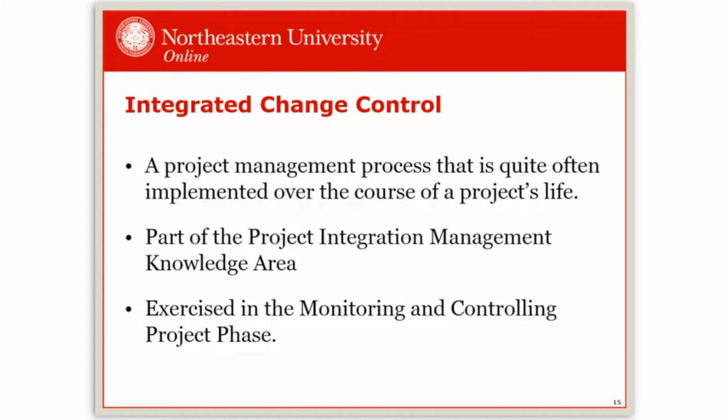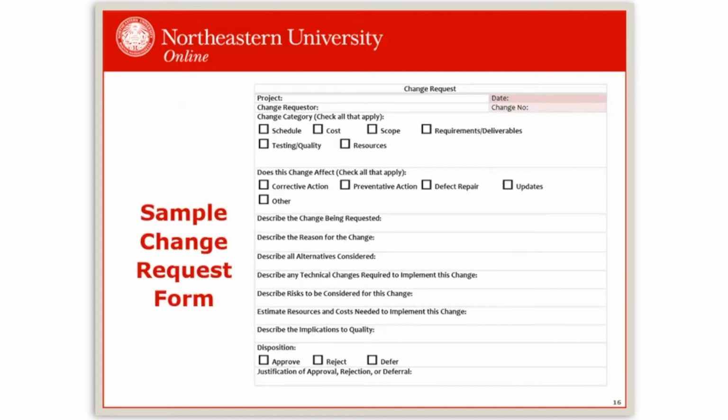And so in your risk management plan, we really want to decide the process for a realized risk. Does it stay in the register? Do you move it to the issue log, the change log? There are some companies that I work with whose enterprise software automatically does that once it is realized. So it's really understanding what the flow of the risk is through your process.